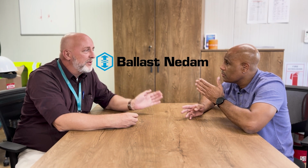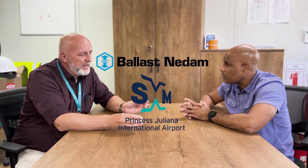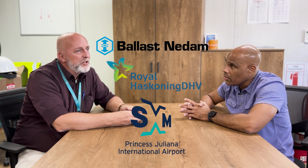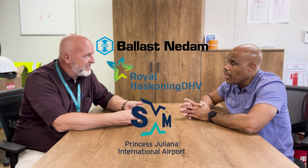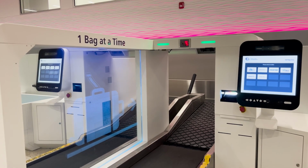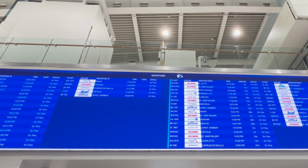Because we have a contractor, which is Ballas Nederland, and we have an employer, which is PGIA. And in between those two parties, the engineer, my company Royal Haskoning, is placed to make sure that the contract is adhered to by both parties. That means not only looking at the quality of the works, but also the measurement of the works, the contractual aspects like programming and scheduling, not only for Ballas now, by the way, because we have various equipment packages, like the baggage handling system, the bridges, the backdrops, and the many screens that you've seen in the building.